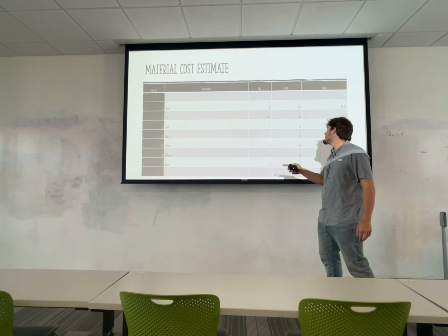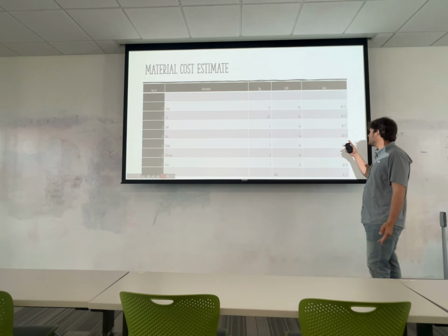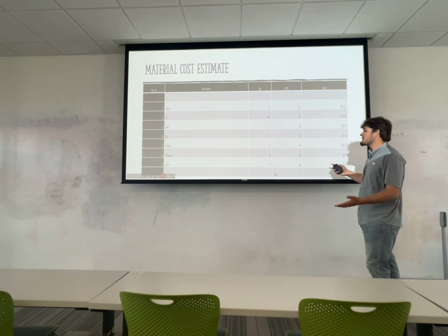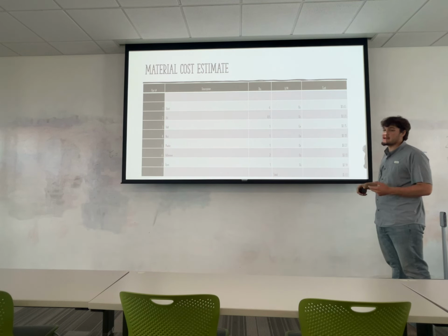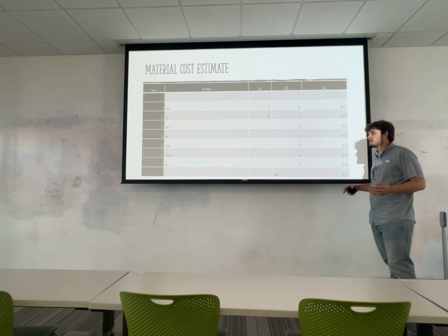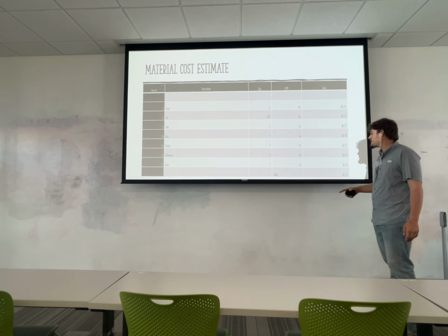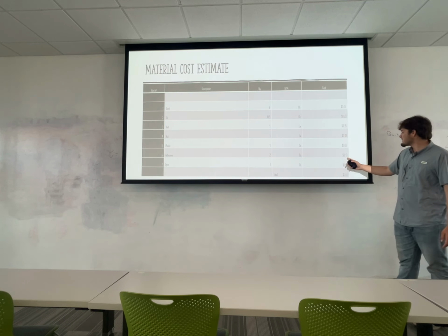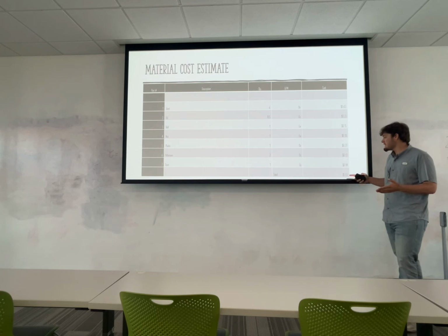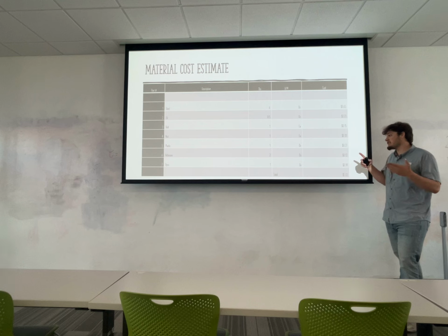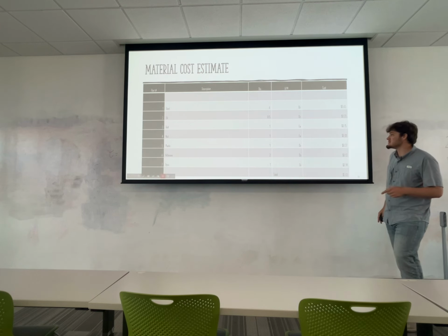Then we have a bolt, which is 15 cents a unit. Then we have a nut, which is 18 cents. Then we have the plastic, which we only used 1 ounce of, and that's 27 cents an ounce. That's for the finger grips on the scissors. Then we use the adhesive. We use 2 ounces of that, and that comes in at 13 cents. Then we have the dyes that go into the plastic for the finger grips. That's 14 cents an ounce, and we only used 1 ounce. So that brings our part total out to $5.02.